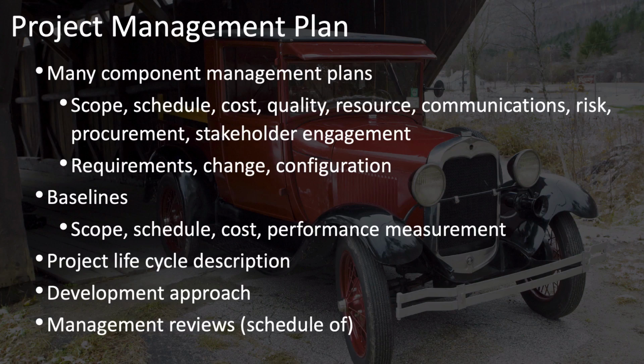The project management plan also includes these key baselines: scope, schedule, cost, and performance measurement, and may include other baselines, as there may be other management plans and documents that are baselined. The project lifecycle description, the development approach, and the schedule of management reviews.